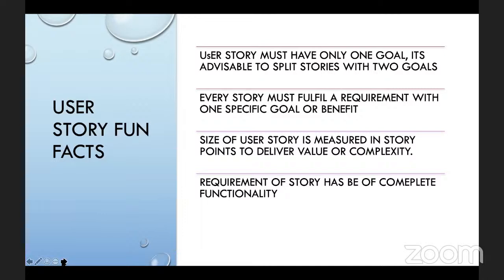It should not be combined with any other story, right? So the moment you see that the story is leading up to 2 goals, that's the time that you need to pause and have 1 minute of silence for yourself, and then say, oh, okay, I think I have 2 goals here. I need to split it. Every story that you write, make sure that it has only one goal.